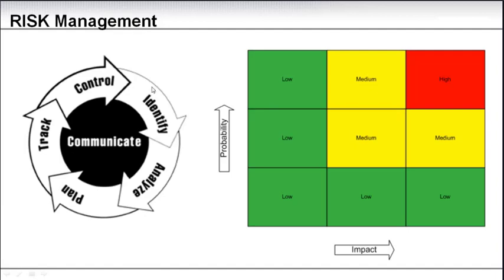So a few things I want to share here, and the first one is risk identification. This is an exercise where you really should involve your entire team. I have had good experience doing an interactive risk exercise with post-it notes and paper, where you get everyone engaged in identifying the risks in a room, and at the end of the day you group those risks and assign a person who owns it as of now.